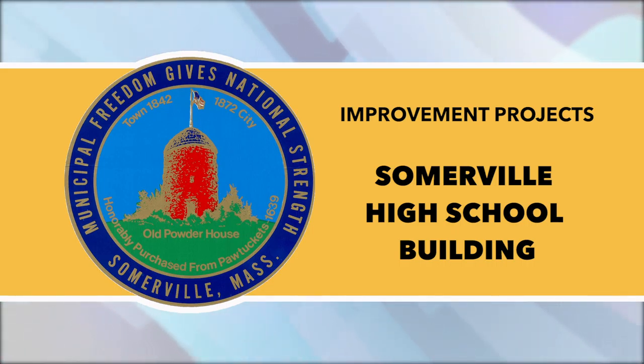On Thursday and Friday, January 9th and 10th, crews plan to arrive as early as 3 a.m. to prepare for work to start at 4. The early start times are required for successful installation. Each floor slab needs to be placed in one continuous operation, ranging in duration from 12 to more than 16 hours. Trucks will enter and exit the site using Highland Ave between Vinal Ave and Central Library.